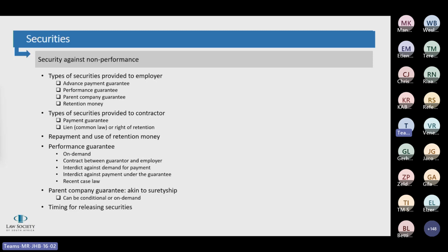The courts have not yet been presented with a case where there was a clear and unequivocal provision in the underlying contract allowing for that principle, that underlying contract exception, to be adopted. The most significant case on this issue is ASJV versus Sanral, where the contractor argued that South African law should be developed to recognize this exception, so that if the underlying contract specifically restricts or qualifies a beneficiary's right to call on a guarantee, a contractor is entitled to interdict an employer from doing so until the conditions in the underlying contract have been met.